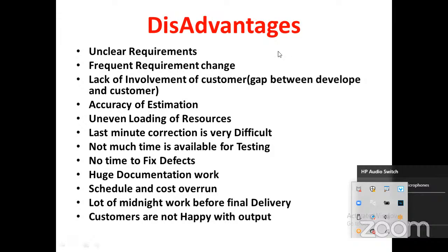Cost is very high. Is it clear? And uneven loading of resources. Is it clear? Not using the resources properly, because in the waterfall model, the designer will design the screens, the developer will write the code, the tester will test the code, but these people will not work simultaneously. After completing the total designing of the project, only then will development start. After completing the development, only then will testing start.